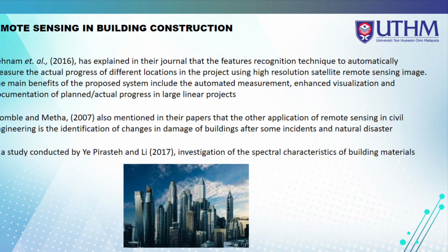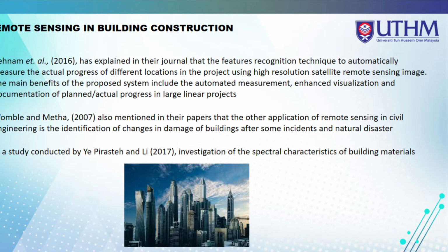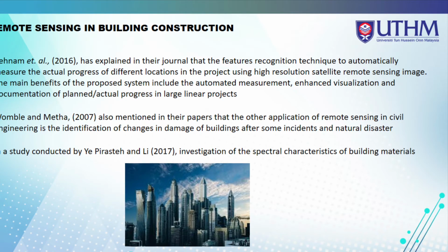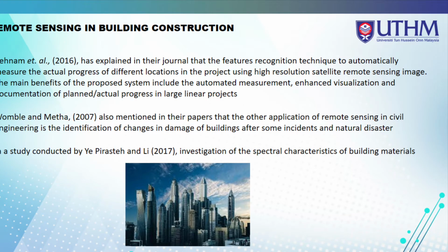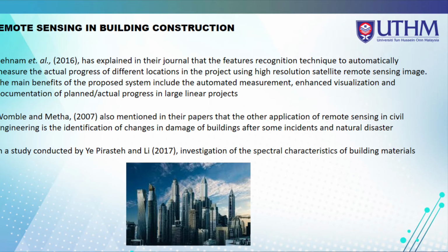Vietnam has explained in their journal that the features recognition technique automatically measures the actual progress of different locations in the project using high-resolution satellite remote sensing images. The main benefits of the proposed system include the automated measurement, enhanced visualization, and documentation of plans or actual progress in large linear projects. Thus, this kind of application can help in reducing the time consumed while doing the task and also the complexity of the task.